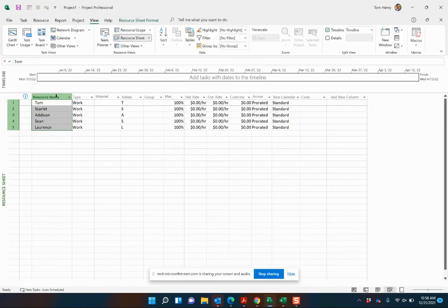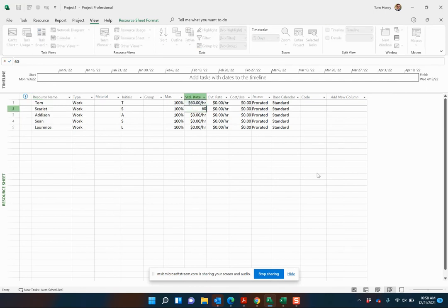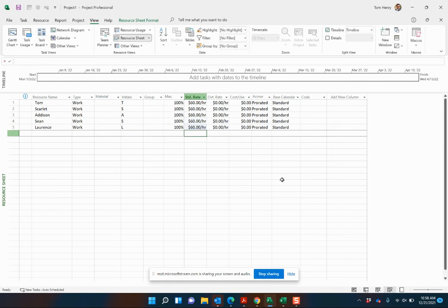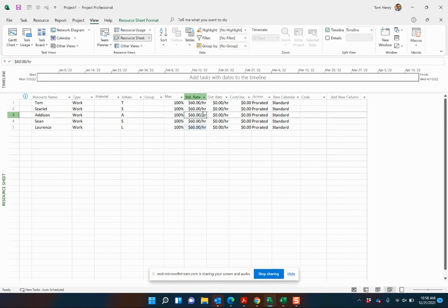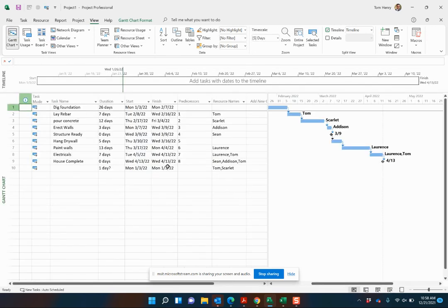Once you've done that, you actually want to come in, give them a standard rate, maybe $60 an hour. Microsoft Project is going to be able to start calculating how much our project is going to cost based on the duration and how much work these people are working on those projects. Boom.